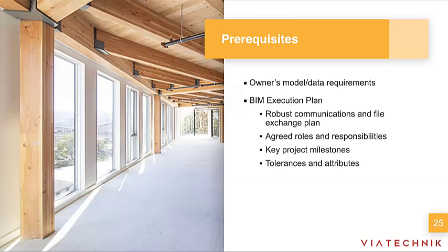The BIM execution plan also should detail working procedures and software that we will be using at different stages during the modeling and the coordination process, as well as any plugins and applications, such as you might already know, BIMTrack or Revizto, that will be used to track clashes or responsibilities.